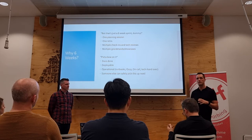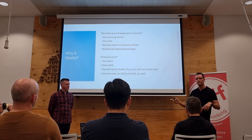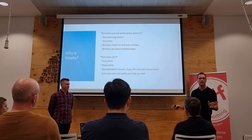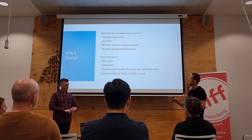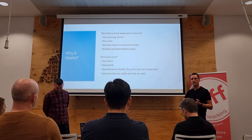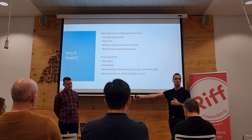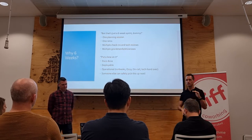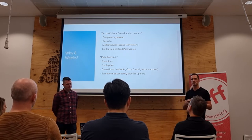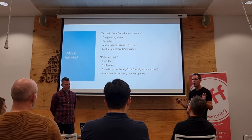So one of our key things at the end of our six-week cycle, and that Eli really insists on and I back him up with, is that we're done. Not like, oh, is it done? Oh, it's not done. It's done. When you are done, that can be handed over to another team. Maybe next cycle, maybe in 6 months, maybe in 2 years. But there's docs there ready for it. It's got observability and monitoring. It's got an on-call policy. It's got run books. The whole thing's done.